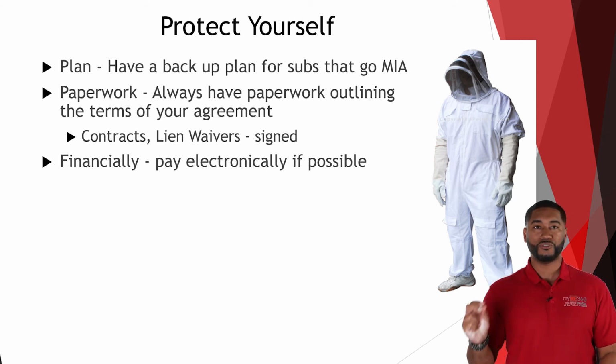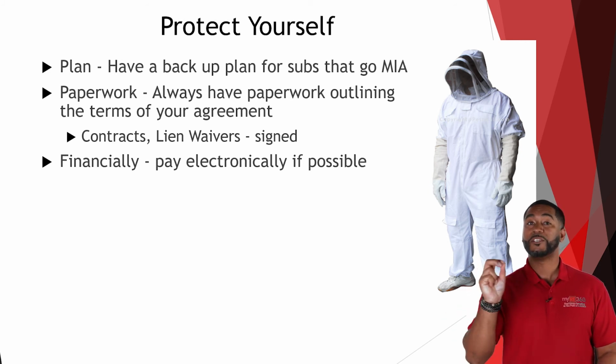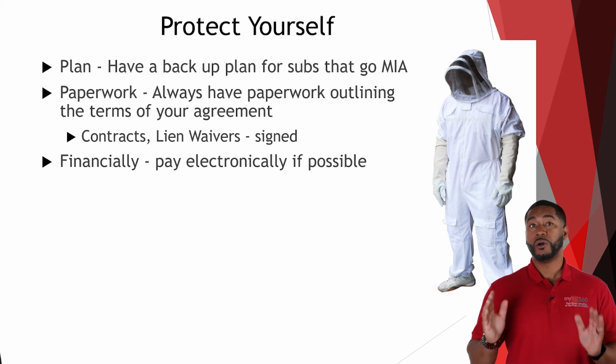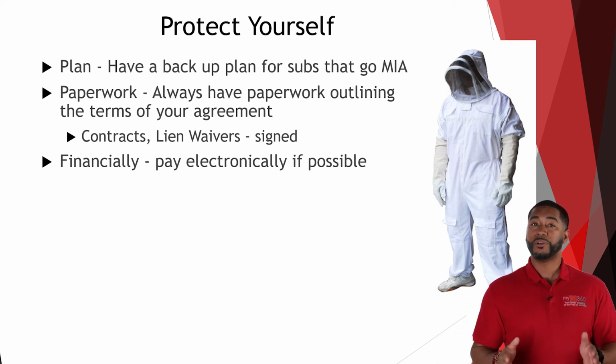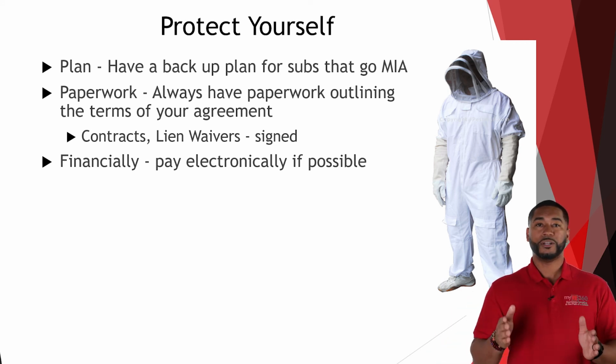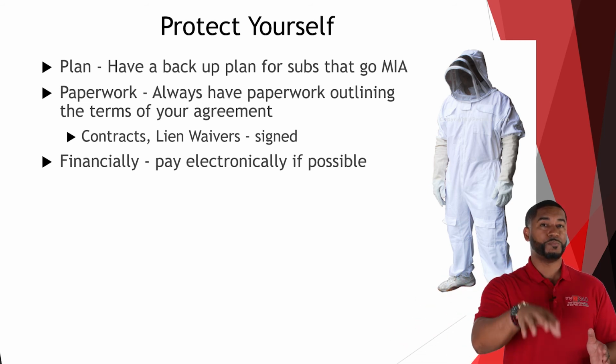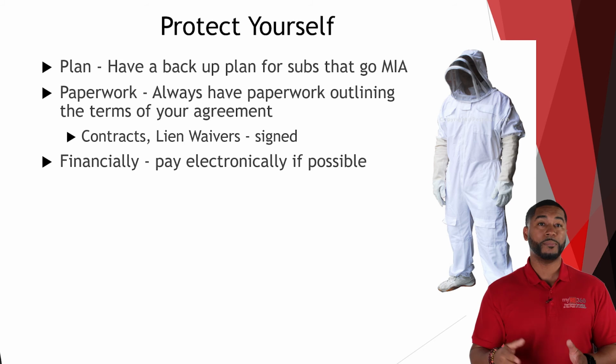So when you pay someone electronically and you have contracts in place that outline a certain degree of performance or a particular product or service to be delivered, and that is not adhered to, you can dispute that transaction and be reimbursed from your issuing bank, credit card company, etc. So even if you were to use one of these third-party payment processing services, make sure that they have some type of vendor transaction protection program in place, so should your services not be rendered properly as expected, you can dispute with that third-party payment company and they'll be able to reimburse you.